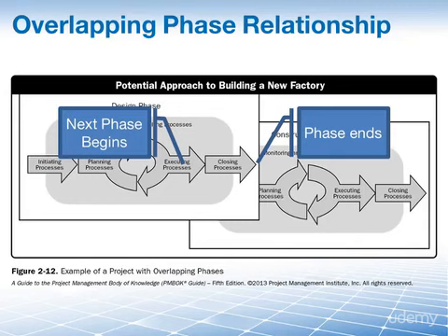This can help speed up your schedule. But if you are starting the initiating or planning process before closing out the previous process, you of course will run a lot more risk. Still, this phase relationship is useful if you really need to cut your schedule time.